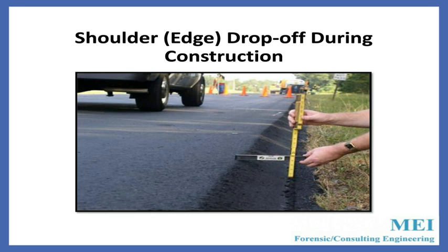During construction, this is what it should look like. When you do an overlay of your road — usually on existing roads the local DOT will allow an overlay rather than ripping the road out — they are put in one to two inch increments. So when you add two inches to an already two-inch drop-off, you now have a four-inch drop-off, which can be a very bad situation. What you do is build a taper — about a four-to-one slope — so that if someone goes off the road during construction, they can easily remount without damage or injury.